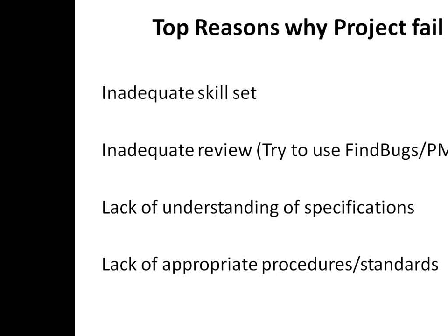Now let's see some of the top reasons why IT projects are failing, especially in the Asian countries. One is inadequate skill set. Sometimes nowadays I commit something to the client that I will do a project using cloud computing technologies. Now I realize that in, say, Bangalore, cloud developers are not available, or it's very difficult to hire a cloud developer. So I should not commit to something which I know is a rare skill set. I'm just giving an example.